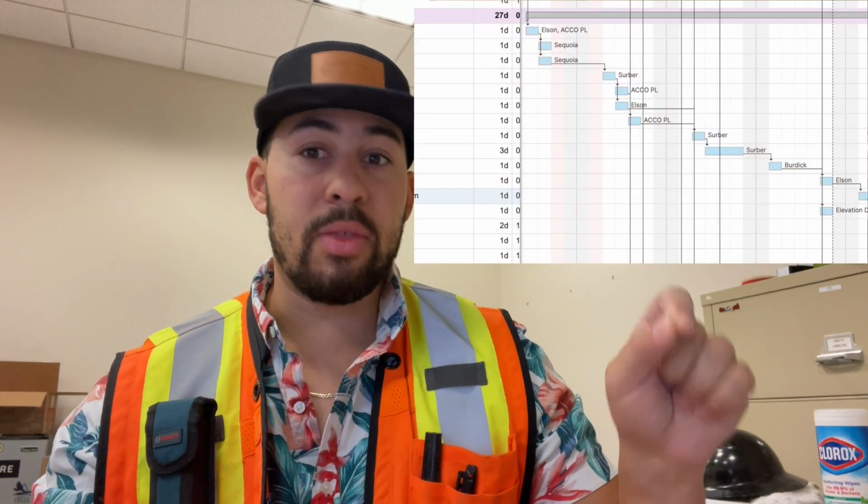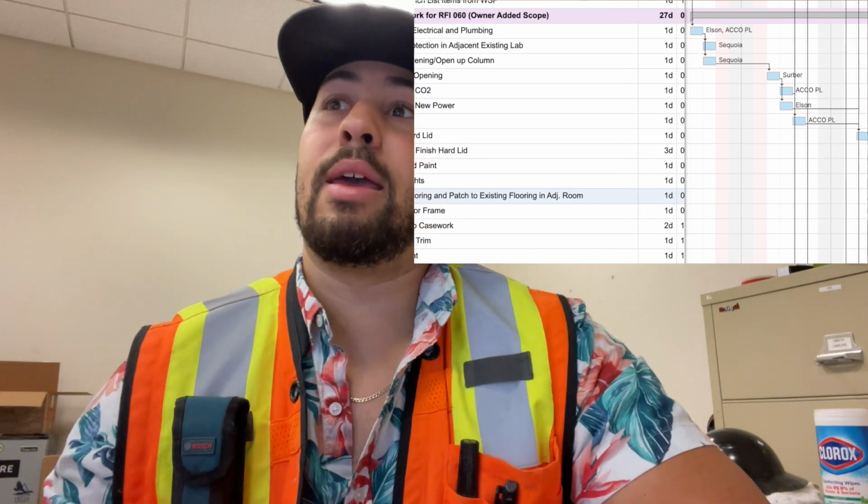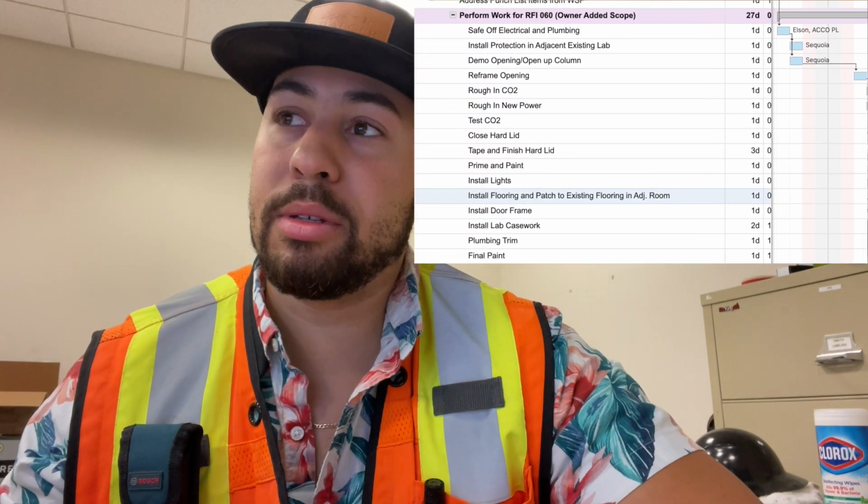So with the schedule in mind, I've had to literally put in delay impacts, just to outline all the different things that affect the schedule and communicate to the owner why our end date is where it is. And sometimes they don't care and they still want you to maintain that date.